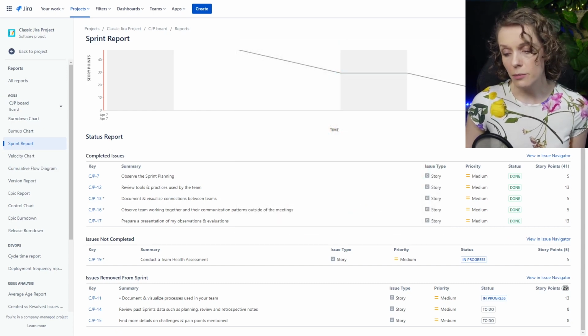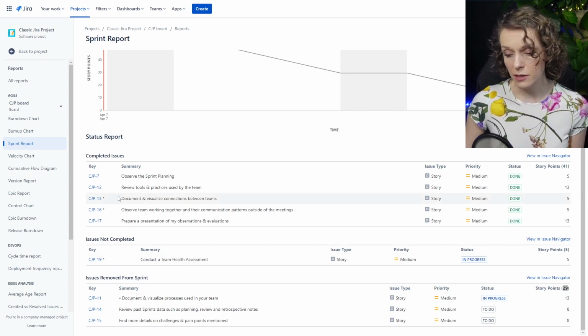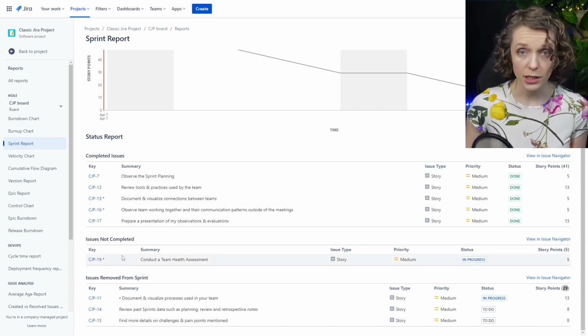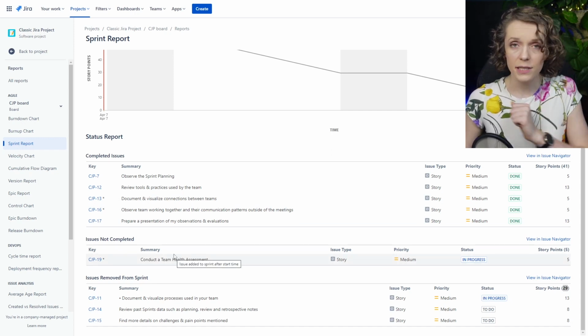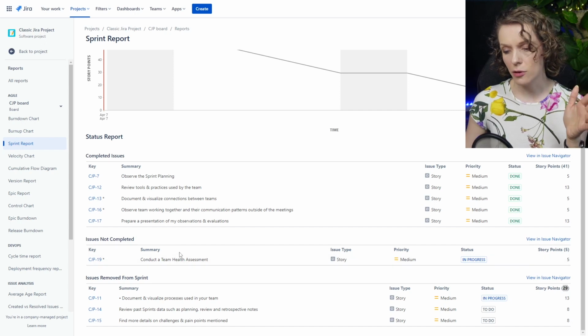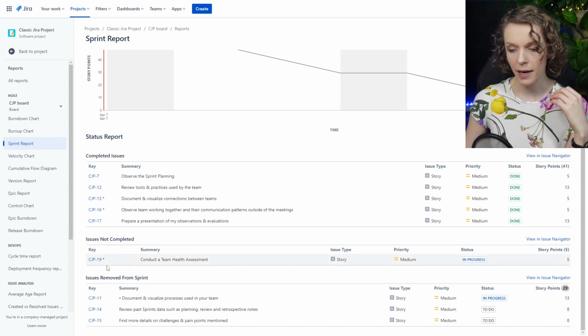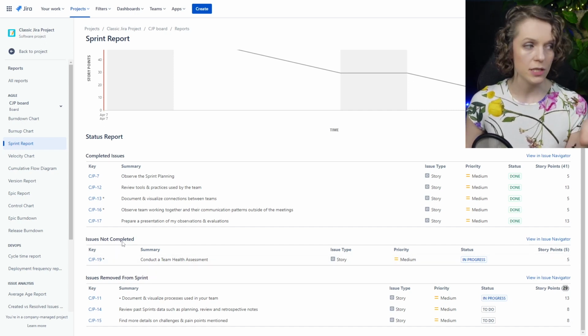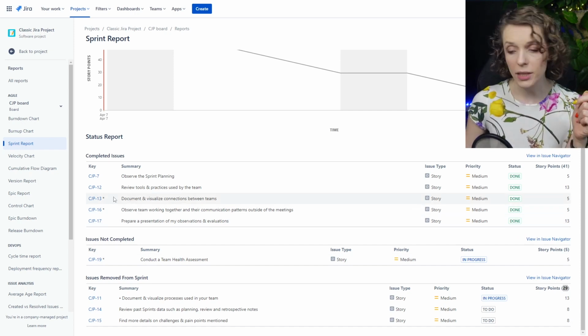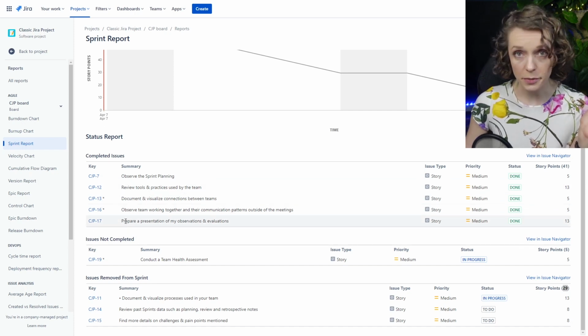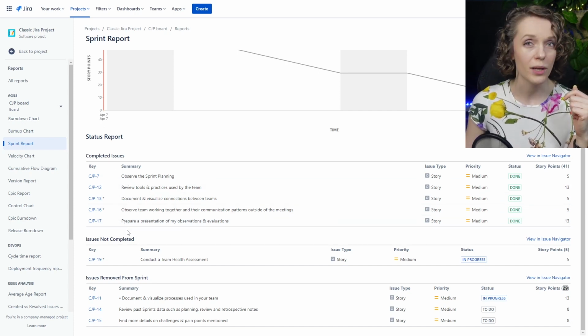First of all, the sprint backlog is supposed to change. It is normal. So just the fact that these items are changing doesn't necessarily mean that something bad is happening. But it can give us some insight. I would say that if your backlog changes by more than 50%, which is our case, it is a bit concerning, and you definitely need to look into that and look into other stats and other information in your sprint report to help you identify whether it's a problem.